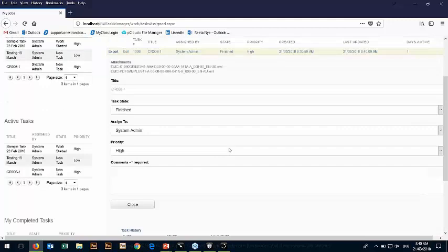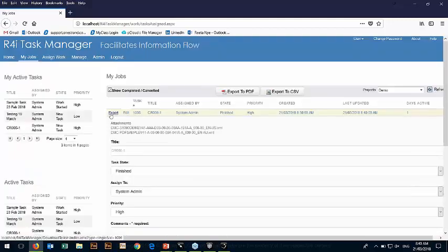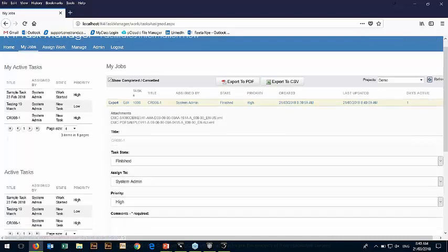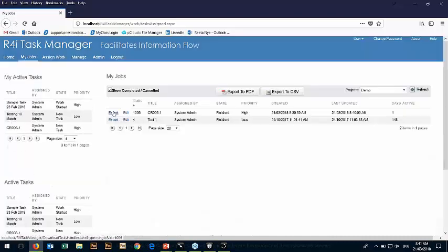I noticed at the top you've got the two buttons, right, of export to a spreadsheet or a PDF. So what happens is we've got two ways. If we do the export here, we're just exporting to PDF this task, because you were in the task view, right? So we're just going to get that one single task. Whereas if we go export to PDF or export to CSV here, it's whatever the screen is showing. So your grid view that's showing is what you're exporting.